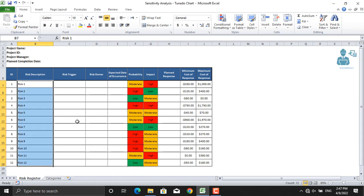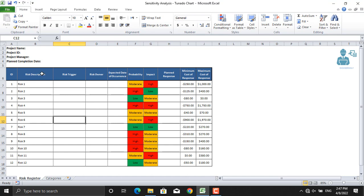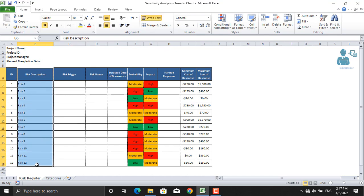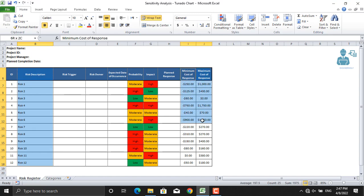In order to create a tornado diagram, we will select the names of our risks. For convenience, I just named my risks risk number one, two, three, and so on. Beside that, I will select the impacts of the risk, the minimum cost of response, and the maximum cost of response.